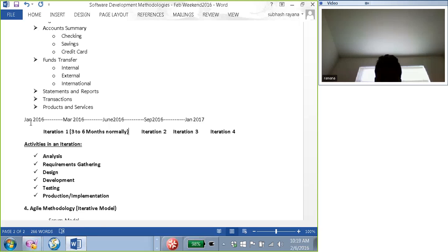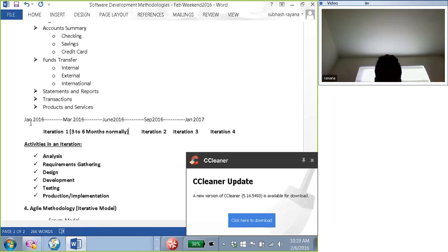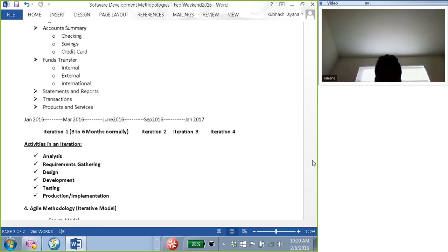But however, if there is a situation where they start complaining about the feasibility of the requirement, then I normally keep pushing them, because I don't want to be in a situation where I go into the meeting, analyze, gather the requirements, spend time documenting it, and after 3 or 4 days, when I review with the technology team, they think that this is not going to work. And again, I have to go back and redo everything. This whole waste of time could have been avoided, had the technical developers or architects, whoever was raising concern, been part of the meeting. We probably would have saved all the time.